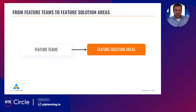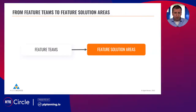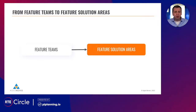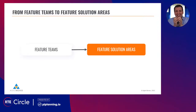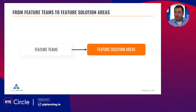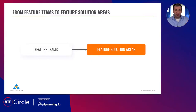The basic idea when setting up Scrum teams is usually that we have feature teams — everyone has heard of feature teams — where you have all the skills and tools necessary to create end customer value, or at least a significantly independent part of value. This is hard to do if you're setting up a solution train with several hundred engineers, because a single team with eight or ten people is usually not able to generate significant value within such a big system. So we want to get from feature teams to feature solution areas — reviving that feature team idea again, just at a higher level.